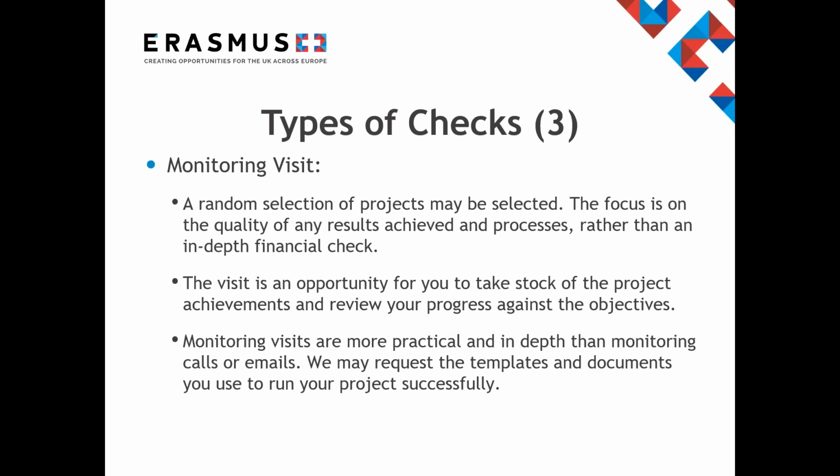During the visit, progress will be assessed against objectives set out in your original application. You will usually be visited by your project officer and another NA representative. The visit will usually last half a working day, but may be longer in some instances. Monitoring visits are supposed to be more practical and in-depth than monitoring calls or emails. We would therefore like to actually see the templates and documents you use to run your project successfully. We also expect to meet at least one of your participants for part of the visit. You should provide a valid reason if this is not possible, though.